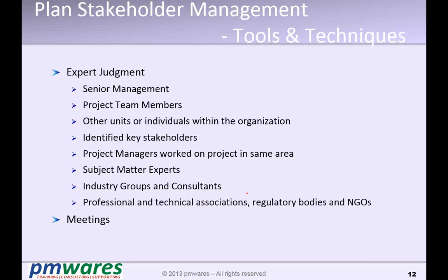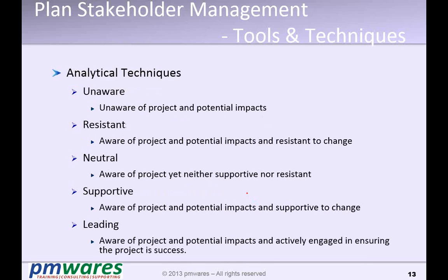And therefore become more and more influential. So we categorize people by their involvement and their intention. Normally there are 5 stages. Technically, we apply an analytical technique and normally put them in 5 categories. The first is unaware: whatever you're doing in a project, he is not even concerned about it. Though he is a stakeholder, he is unaware.